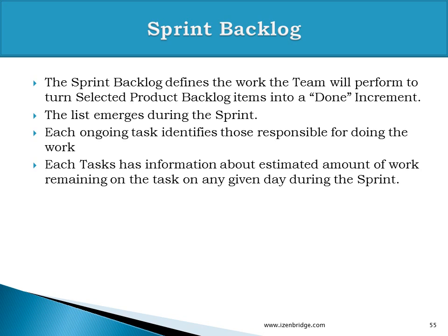If you have 10 items in your sprint backlog, all the 10 items must have an estimate in ideal hours, which talks about how much time is left to finish this particular item. In general, we are not concerned about how much time has been spent for that item, but the sprint backlog must have information on how much more time is required to finish this particular sprint backlog item.